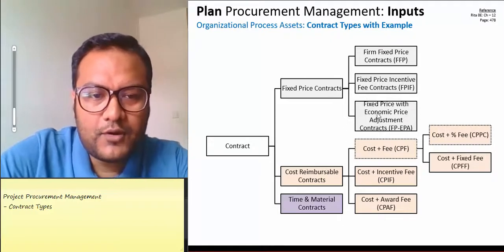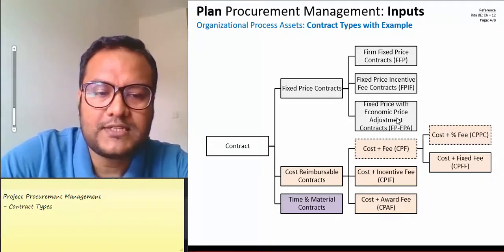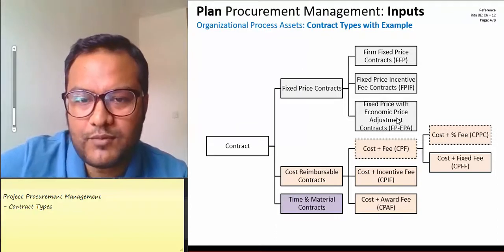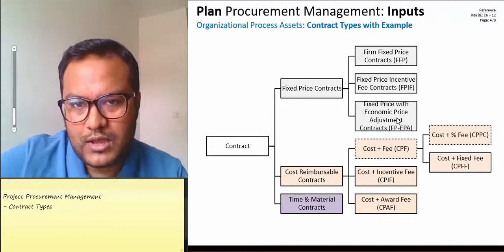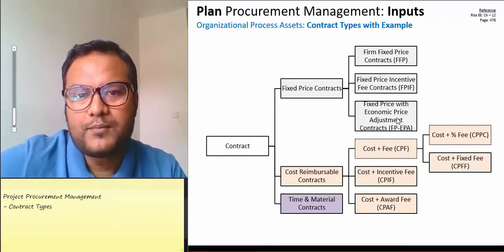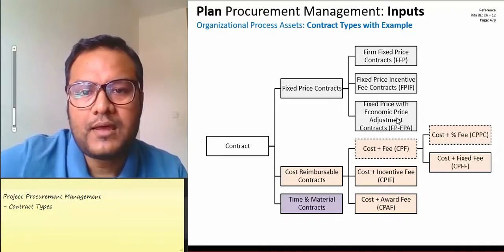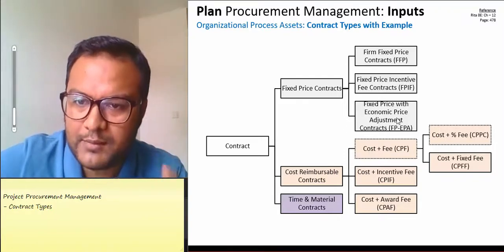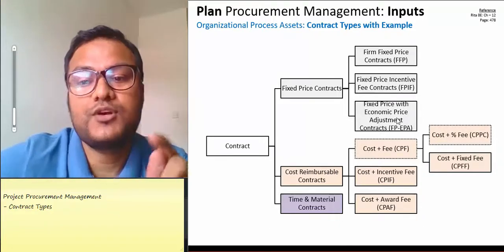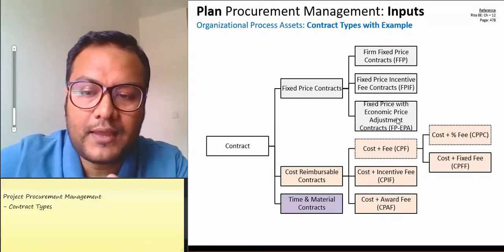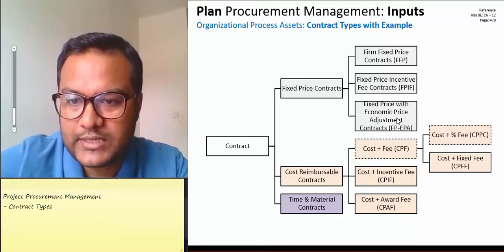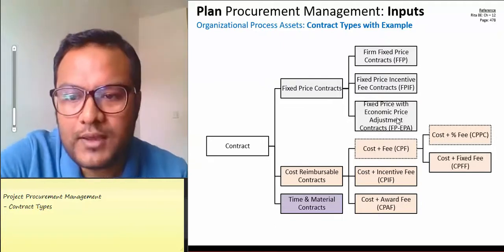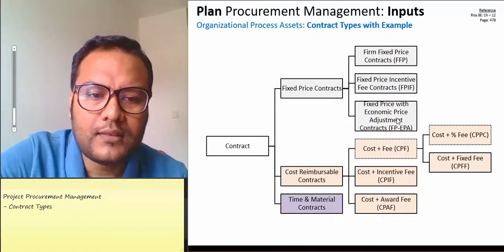The third type, mentioned in PMBOK, is the Fixed Price with Economic Price Adjustment (FPEPA). For example, if we have a contract lasting several weeks for a cement factory, we need to adjust the contract price based on the economy. Every week, benchmarks such as published inflation indices for Bangladesh — for example, 1% or 2% — serve as the reference for price adjustment.